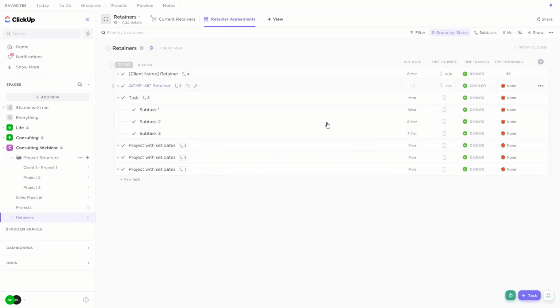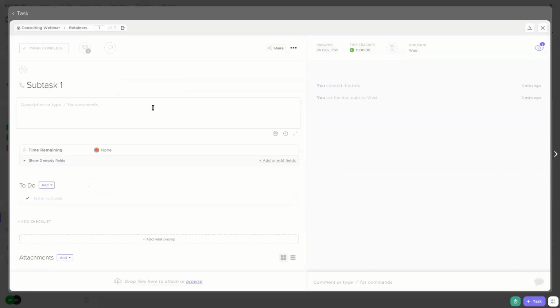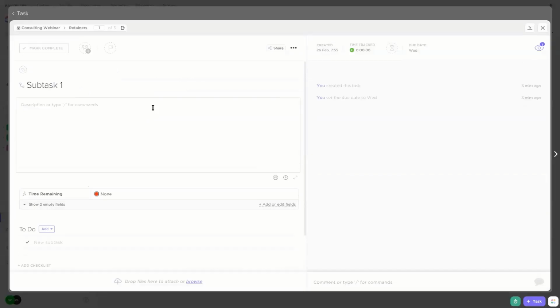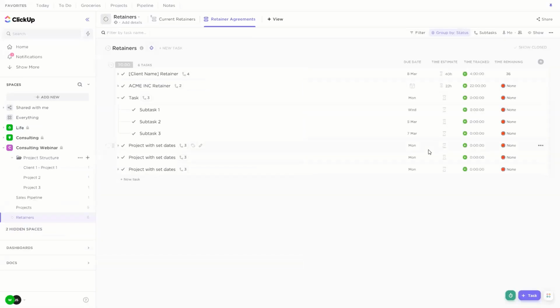When you have the due date set up, so let's use our example here, I can set up a dependency between them. If they get moved, the dependency will force the due dates to be moved. But there's not going to be any big flashing red alert saying you're not allowed to start this task because it had a dependency, if that makes sense. So if I made task 1 blocking task 2, subtask 2, then I moved this one forward a day, this one would also move forward a day. So the function in ClickUp maintains the gap between them. It doesn't do logic of whether or not you're allowed to start the task or not, if that makes sense.